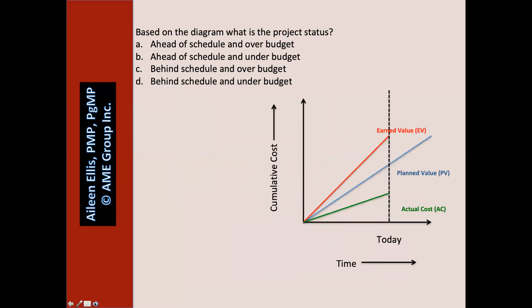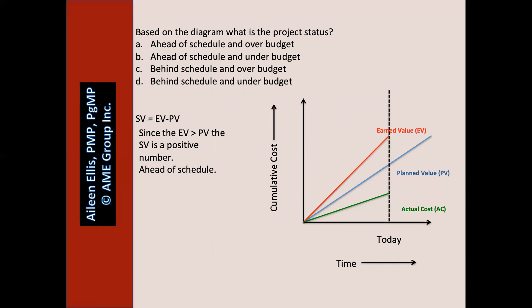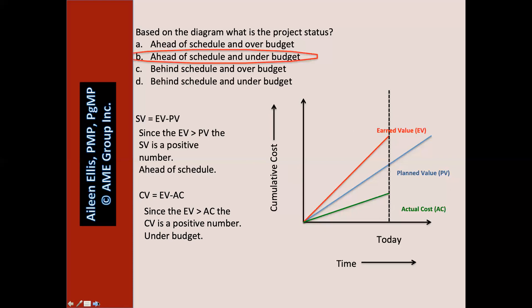Based on the diagram, what is the project status? Pause the video and answer the question. Schedule variance equals EV minus PV. The EV is greater than the PV, so the schedule variance is a positive number — we're ahead of schedule. Now let's also talk about cost: cost variance equals EV minus AC. The EV is greater than the AC, so the cost variance is a positive number — we have more work complete than we spent to complete it. This is a very typical question for the PMP or the CAPM exam.